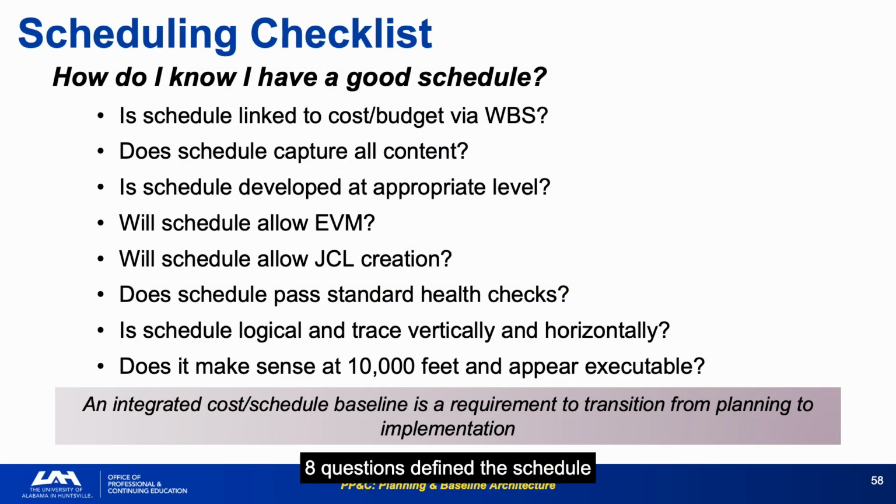8 questions define the schedule credibility assessment. This is the analyst checklist for determining whether the IMS is ready to support a gate decision and serve as a performance measurement baseline. Will schedule allow EVM? Will schedule allow JCL creation? Are the integration tests that reveal whether the schedule was built to enable decision support or just to satisfy a documentation requirement? Does it make sense at 10,000 feet and appear executable?